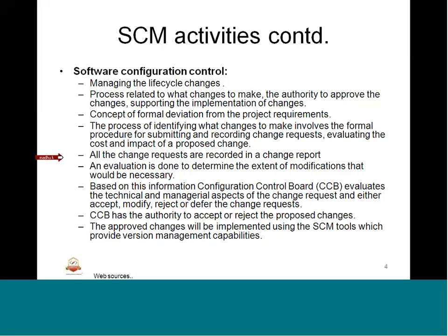All the change requests are recorded in a change report. There is a change report that will identify what changes have been done. So what is the request against which the changes have been done, what is the conclusion, who is the author, who is responsible, how it is controlled, all this will be part of the change report. An evaluation is done to determine the extent of modifications that would be necessary. So basically the change request will be evaluated to determine what is the modification or the change that is going to happen.